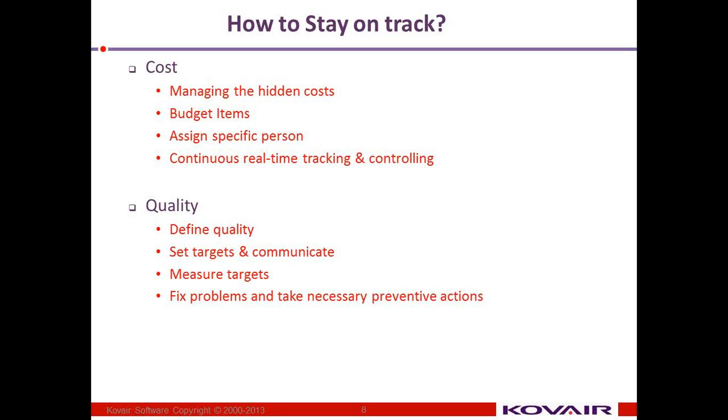Then we should always assign a particular deliverable to a specific person and not to a generic team, because that will give us a proper picture of the cost: what is the actual cost, what is the planned cost. Every figure will be much more real. And as I said, continuous real-time tracking and controlling is necessary all throughout for all the parameters.